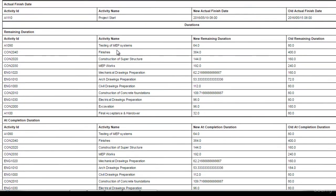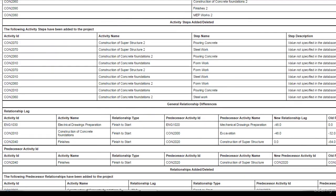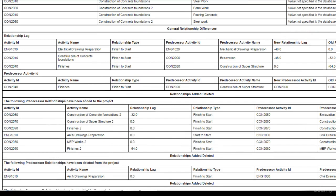Let's take example of finish. In finish, the remaining duration of activities was 384 hours and in my new project, it's 400 hours. Similarly, you can see here in my new project, I have added steps to the activities while in my old baseline, these steps were not present.